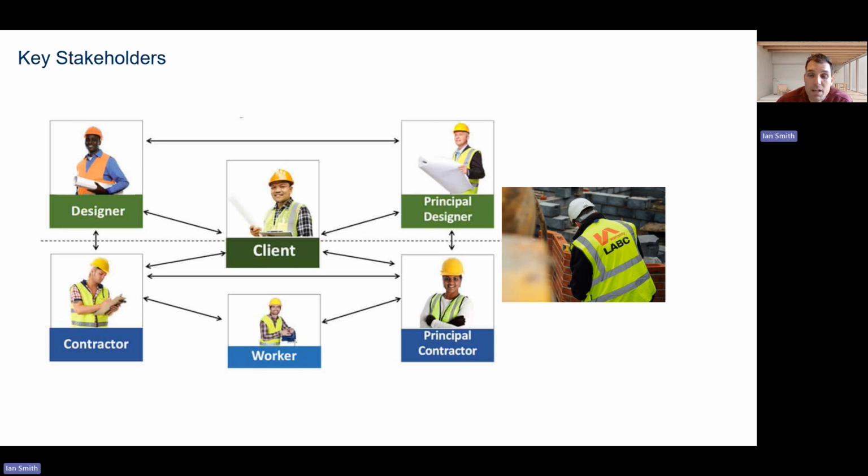Another important reason for project planning is to comply with our CDM regulations, as these require construction work to be properly planned from the outset, giving specific duties to people such as clients, principal designers, and principal contractors. So careful planning helps ensure that hazards such as deep excavations, heavy plant operations, and concrete works are properly